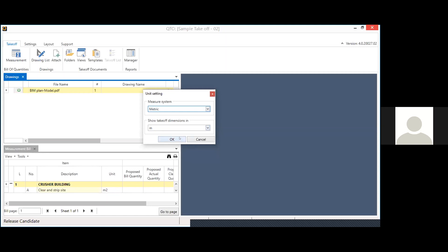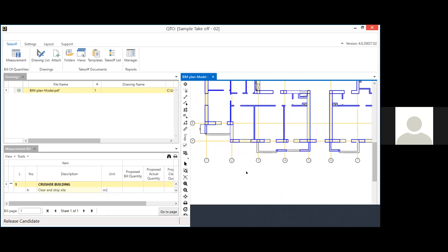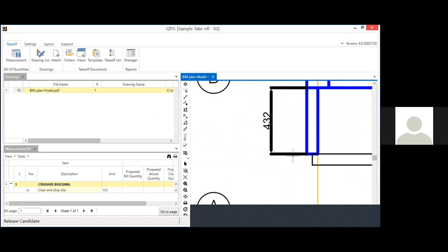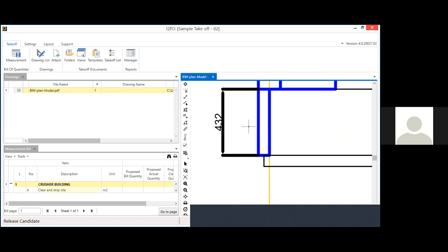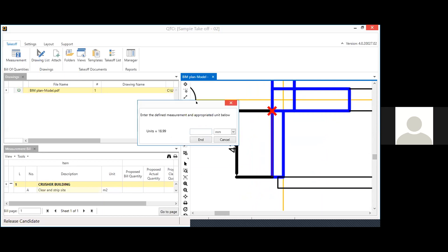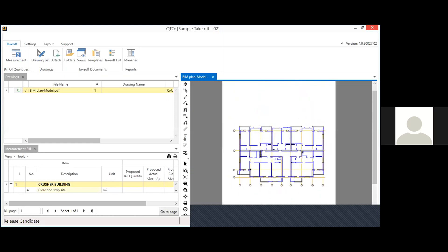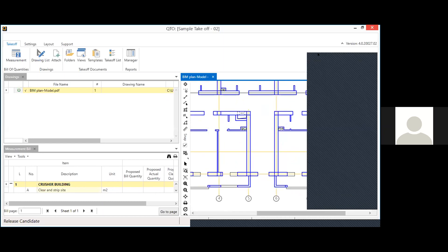The first time you open a drawing, it will ask for the measurement system. Select metric — meters. Candy does not know the scale used while drawing, so you need to calibrate it. You need at least one measurement inside the drawing to establish the scale. For example, a distance shown as 18.99 units can be told to Candy as 4.32 meters, and after confirming, your drawing is calibrated.